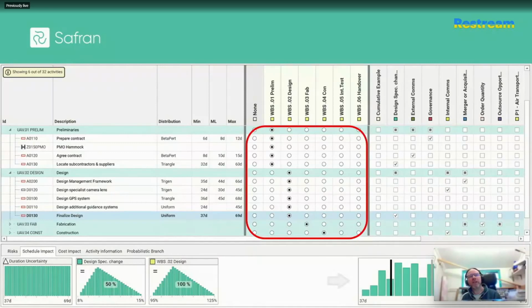But regardless of what you use as a thematic content to your risk driver with regard to estimating uncertainties of task duration, there is one key thing that I've not yet mentioned, which is worth saying. Safran will default your estimating uncertainties to apply a correlation that combats the effect of something called central limit theorem. It falls outside the scope of today's session, but just drop me a message and I'll send you a blog that covers it in some more detail.